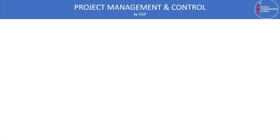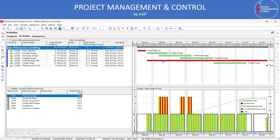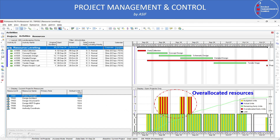Here is a typical screen showing a small project with overlapping activities. You can see the over-allocated resources, and the black dark line represents the resource limit. In the area where parallel activities overlap and use the same resource, the requirement doubles. For example, if our limit is 10 hours per day and the requirement shows 20 hours, it means the resource requirement is double — so either we increase resources or level them.